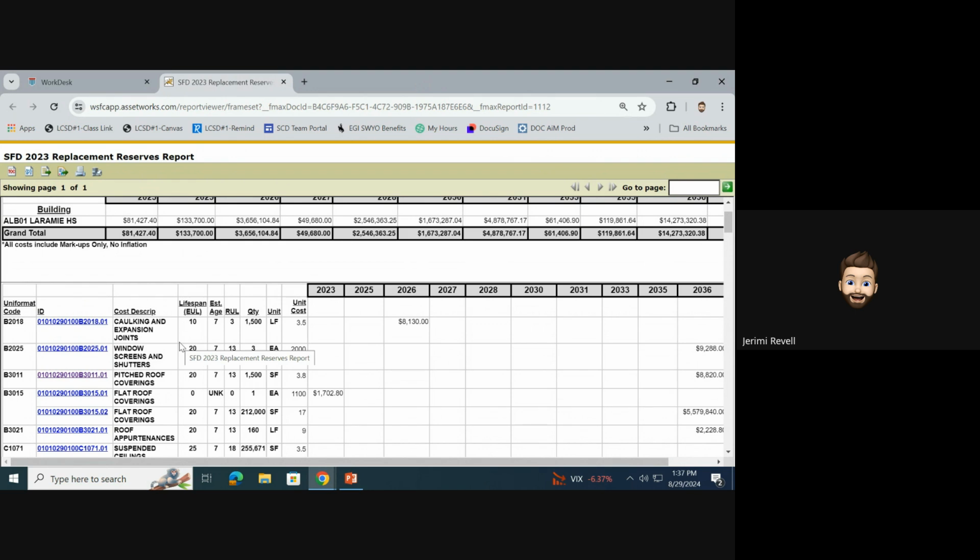I think I should probably add that, and I think I mentioned this before, but I'm not sure if everybody caught it, but it's replacing like for like. So the example that I like to use on this is a coal-fired boiler. Well, we all know that nobody's going to go out there and replace an old coal-fired boiler in their building with a new coal-fired boiler. So if you plan on putting a high efficiency boiler in, you're probably going to have to make some modifications to your estimate on cost when you submit your planned work order for doing that.